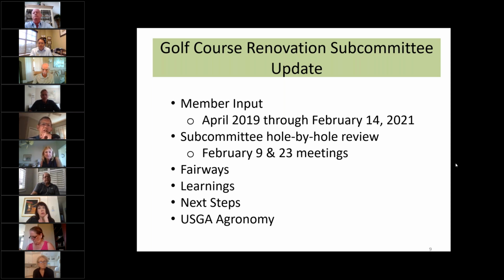Mm-hmm. Yeah. Dave, it would be helpful once they have a bid to look at the payback period, because it seems like a 10 or 15% premium would pay back in a pretty short period of time. And that may help people understand that we're not going to have to pay ad infinitum for wooden bulkheads. Right. No, I think it could be included in part of the financial analysis to be put out there for the members to understand there is a long-term impact of this.